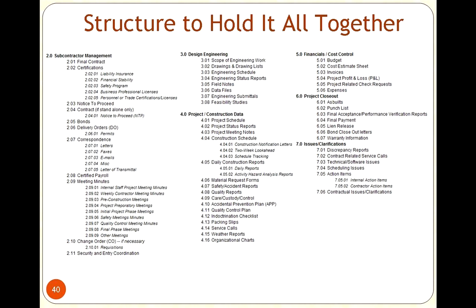And the great thing was, when I set this up electronically, I created a folder template, and it was just empty. It was just all these folder names, empty, so I just created it one time. And then whenever a project would come along, I would copy that folder structure into that new project folder and then just start populating it. So it's almost like I created an empty folder structure first that I could copy as a template or a boilerplate into other folders. And I did the same thing with email.